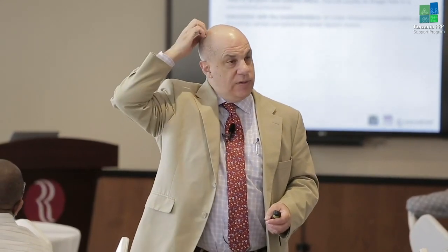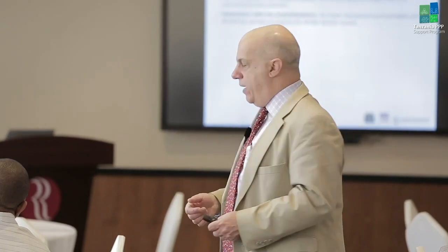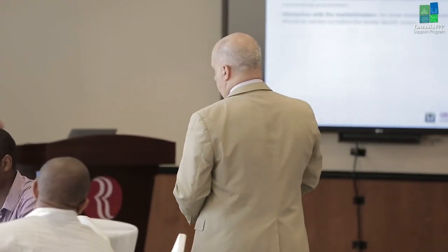But we, together with the government, have been talking to potential participants in the procurement, really kind of going back to, not unlike what we talked about with our screening of potential projects, but we want to learn if they would be actually interested in the project. If they're interested, are there any conditions or issues that need to be addressed before we go to the market? Because we want to have a very tight procurement. So it's fine to go and engage with the market to get some feedback from them.